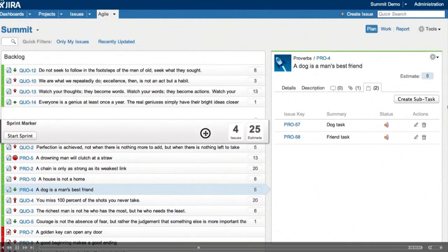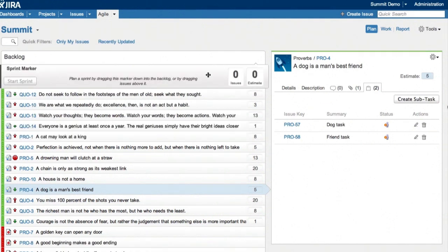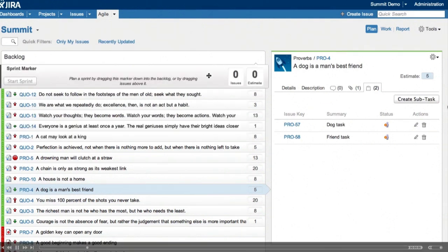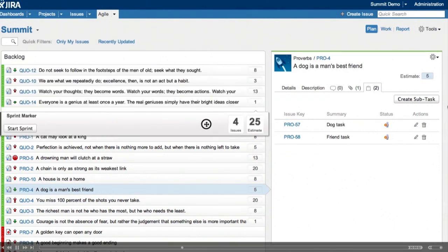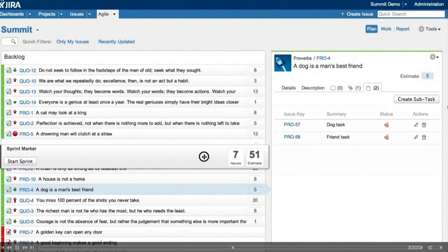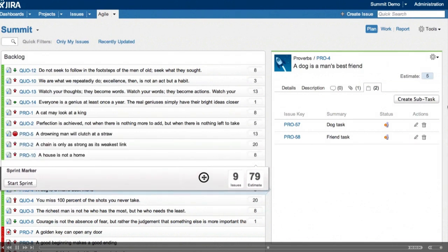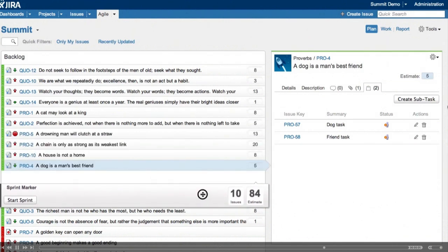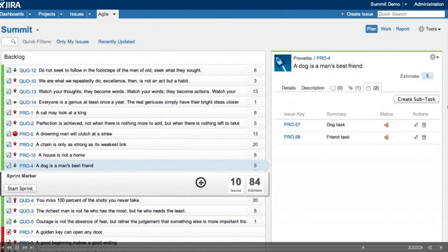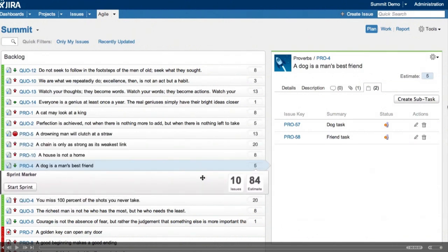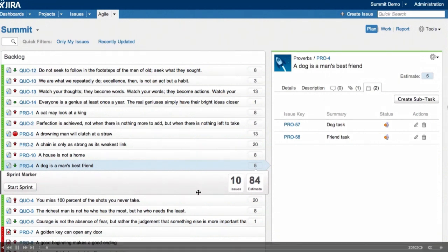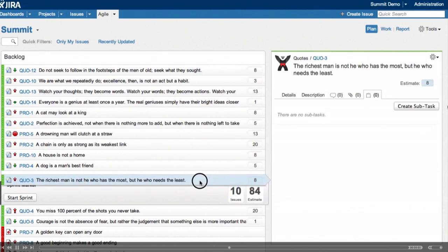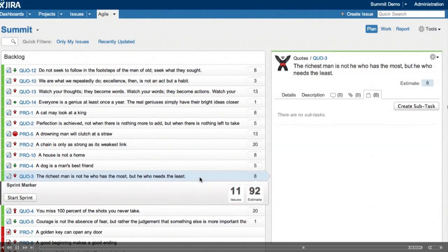But we need to get an idea what the team can commit to for this sprint. And we do that by dragging the sprint marker up and down. And you'll see there's a real-time update. The number of issues in there and the estimation statistic too. We can also move an issue above the sprint marker and drag it into our planned sprint.